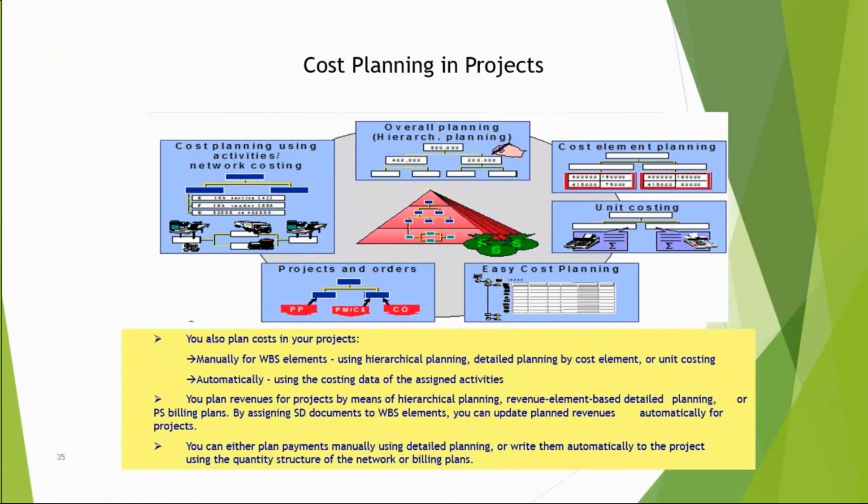Like we will have a number of activities. Activities will have material components. Each material component will have its unit cost, and each internal activity will have its unit cost to perform those activities, and hence my unit cost will be determined through activities.